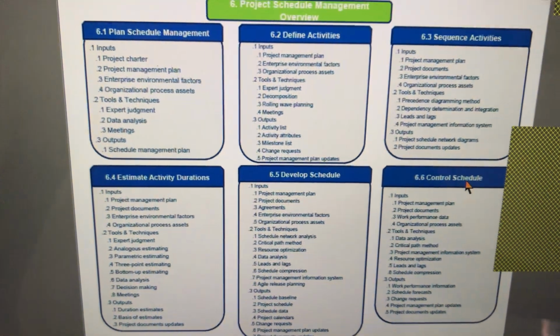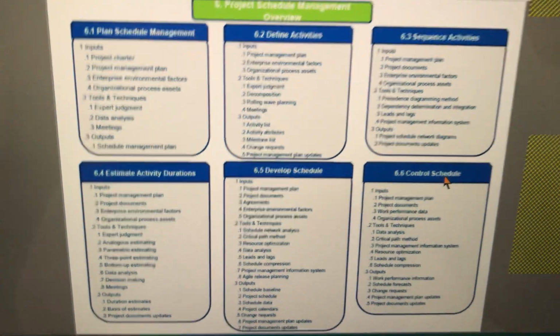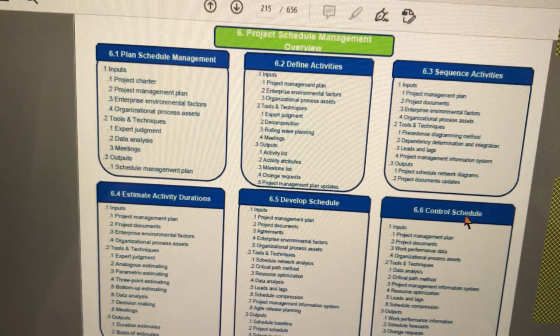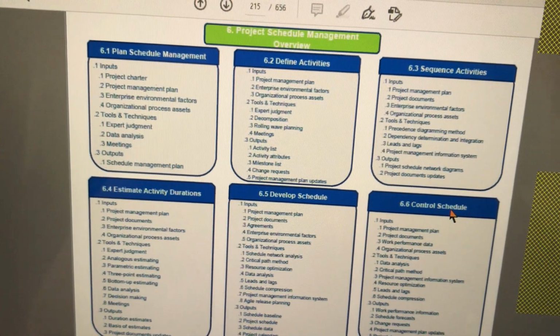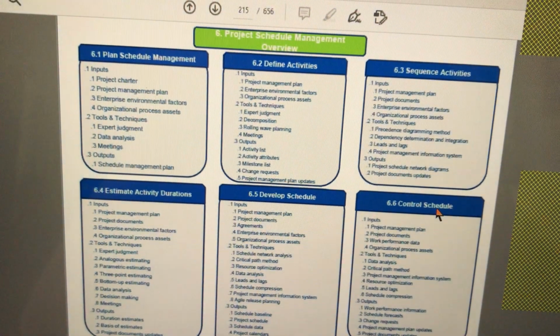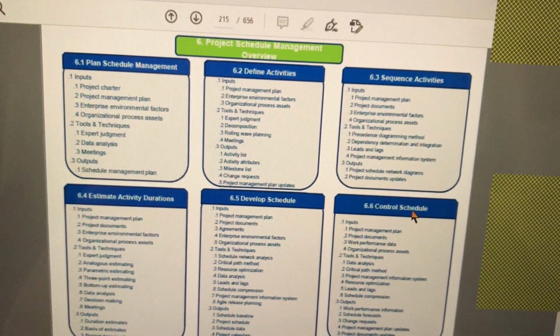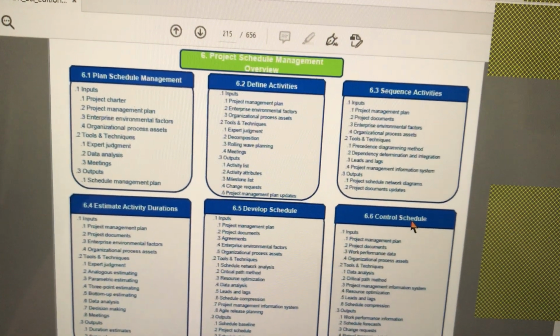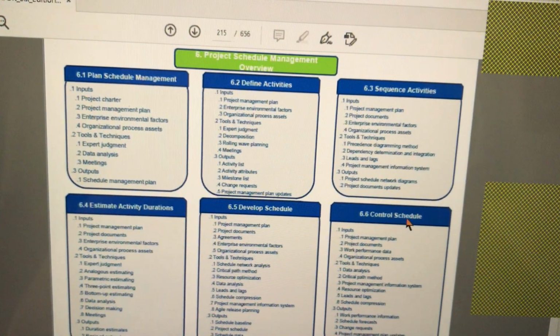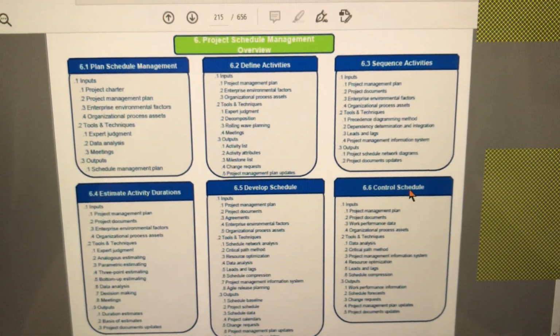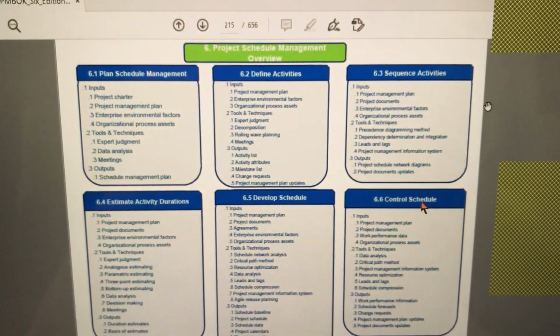Yes, the schedule is a very detailed document which talks about how the project will pan out from a time perspective. From the start of the project to the end of the project, what is the kind of time duration that is required. This is done after the scope is done. In scope, you will define scope and create WBS. Remember that. In schedule, you use the WBS as an input. And where does it tell you this?